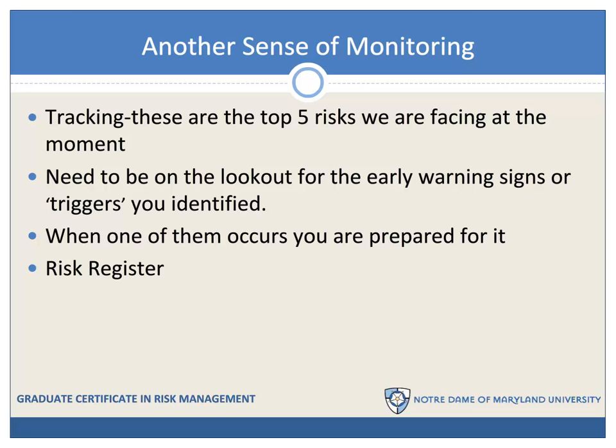There is another sense of the monitoring task to consider. Sometimes we might be tracking specific risks, for example, risks identified in our risk register. Risks that have been identified as of concern have to be tracked. If early warning signs appear, we must be prepared to step in and manage the situations as they emerge and develop. For example, if we identify sharp price increases as a risk for one of our projects, we need to track prices to learn if that increase is materializing.